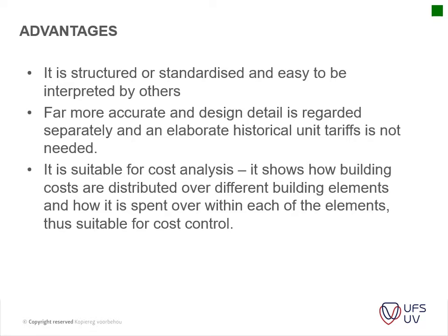There's specific rules of how items are measured, or the components are measured. Far more accurate, and design details required, and is regarded separately, and an elaborate historical unit tariff is used. So you can use old projects, usually bills of quantities, to determine your historical rates.